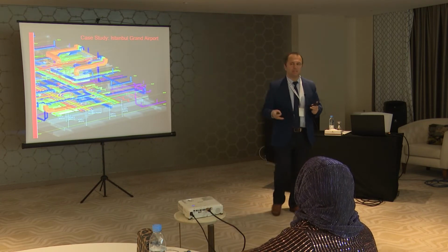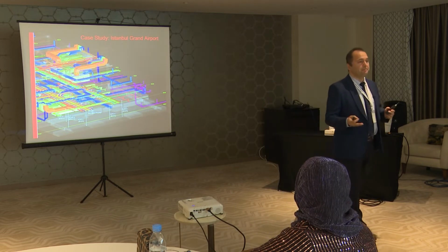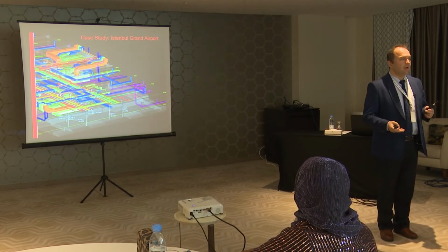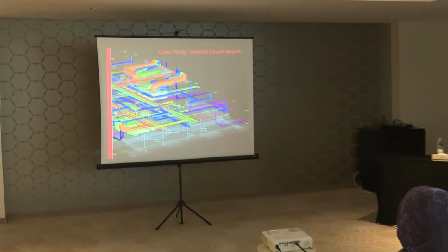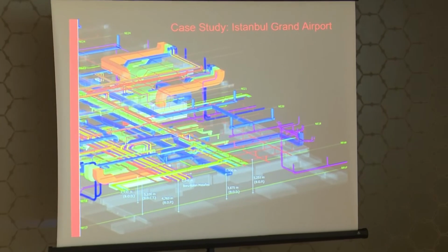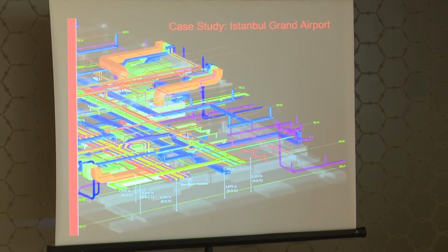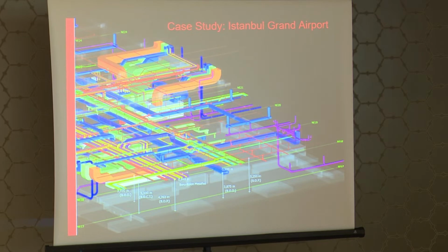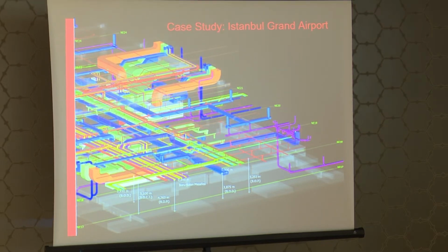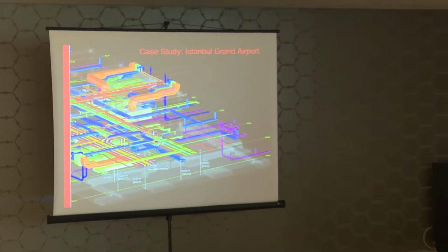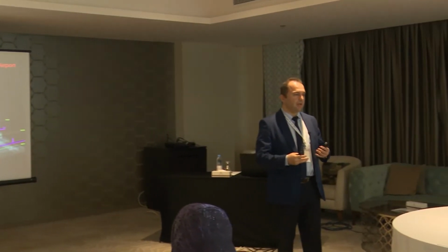How was it completed? It was completed basically via BIM. They had to use BIM, otherwise it would not have been possible to complete it on time. Because of our visits and engagements in the project from time to time, we know that in the first 6 months of the project, they messed it up. So many people were coming on site and there was no proper coordination, and the design outputs and shop drawings were not talking to each other. It was so complicated that within the first 6 months it busted. They stopped because it was quite messy and they couldn't carry on.